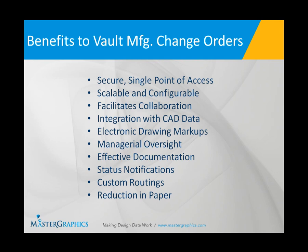There are routings created for this process, so if you have predetermined routings for a particular change order, you can set that up, but you can also customize it further. For example, maybe during a change order process somebody was recently hired — you can customize that routing, add that individual, and now they're part of the process. As mentioned earlier, there's also a reduction in paper. With electronic drawing markups organized in the change order, that reduces those drawing markups and also reduces the amount of paper with the change order itself.